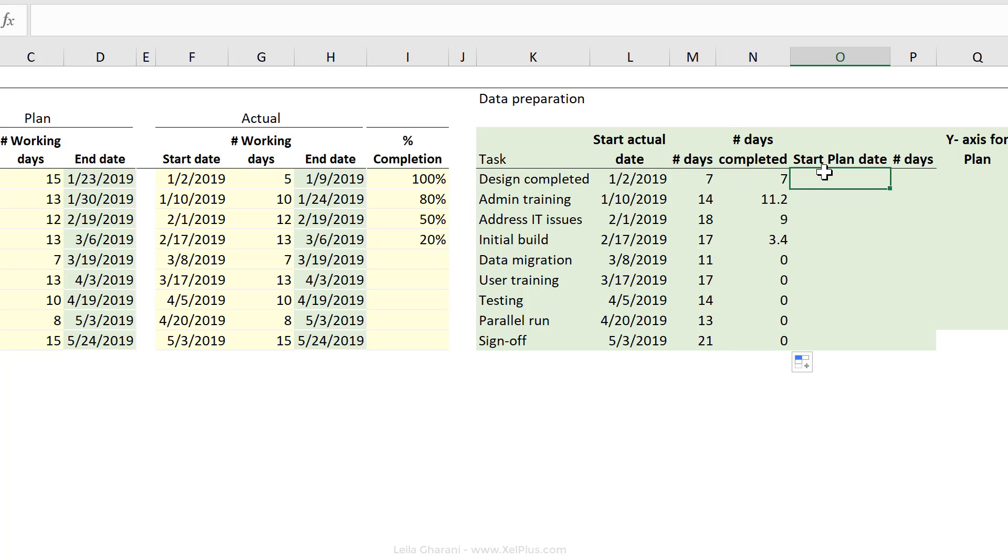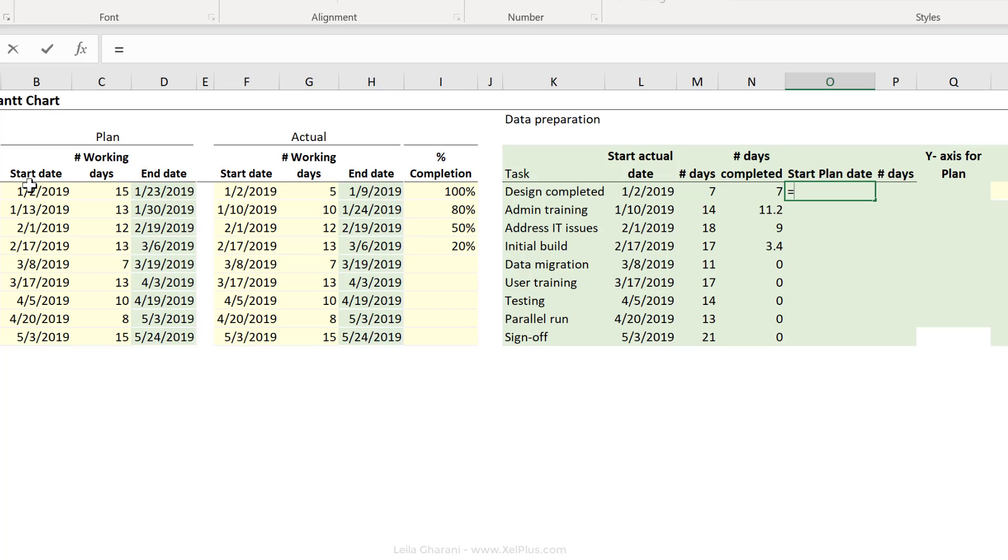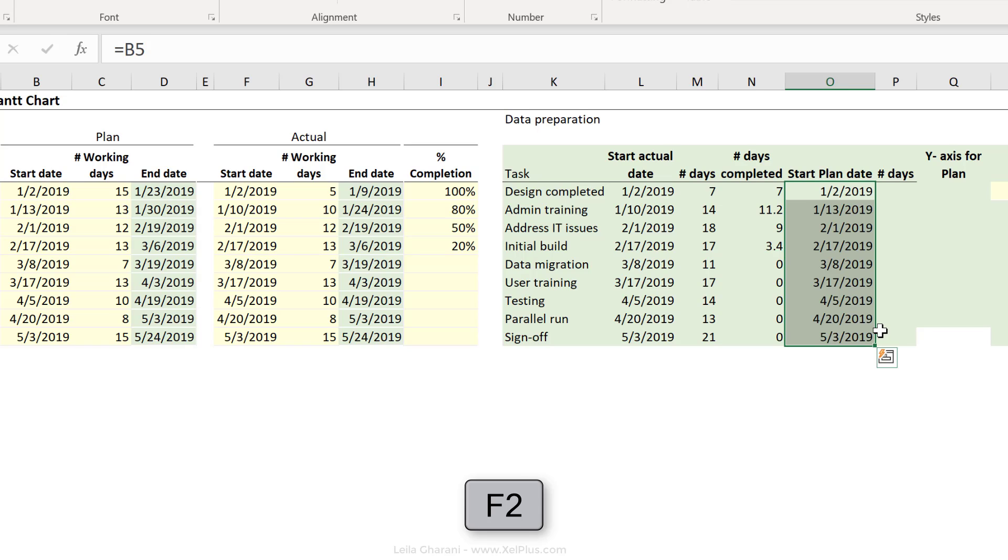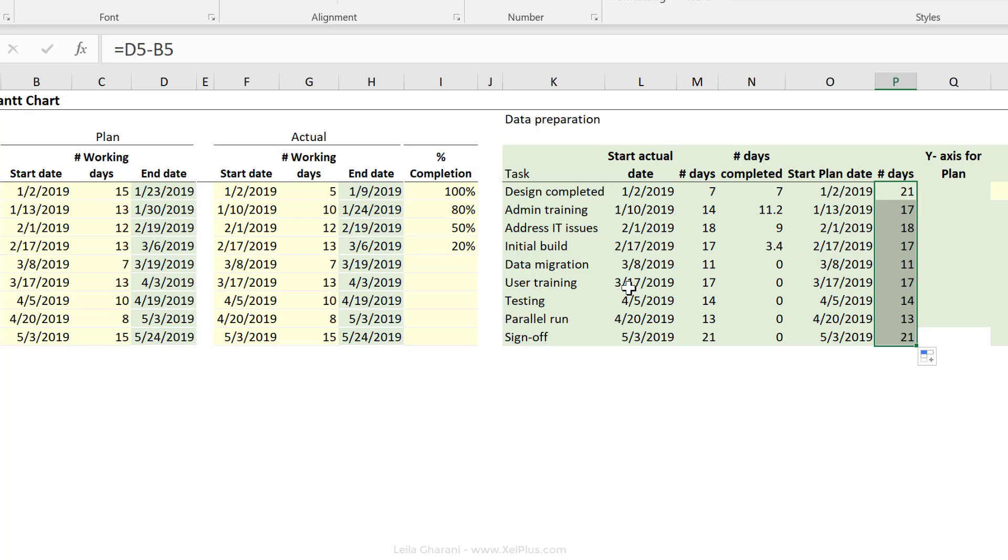Start plan date. That's the start date for my plan. Let's just highlight F2, control, enter. The number of days. We have a similar formula to before. It's the end date minus start date for plan. And let's send this down.